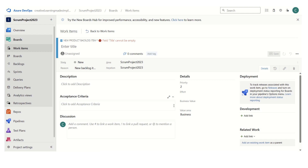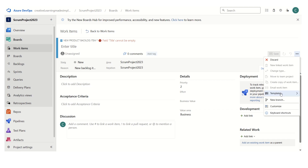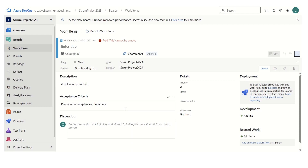Let's say this is the new work item that we want to define. If we have to utilize the template we just created, we have to click on the three dots under templates. We can see the template we defined. If I select it, you can see that it has populated some values — the area, the iteration, the priority, the description, and also the acceptance criteria.